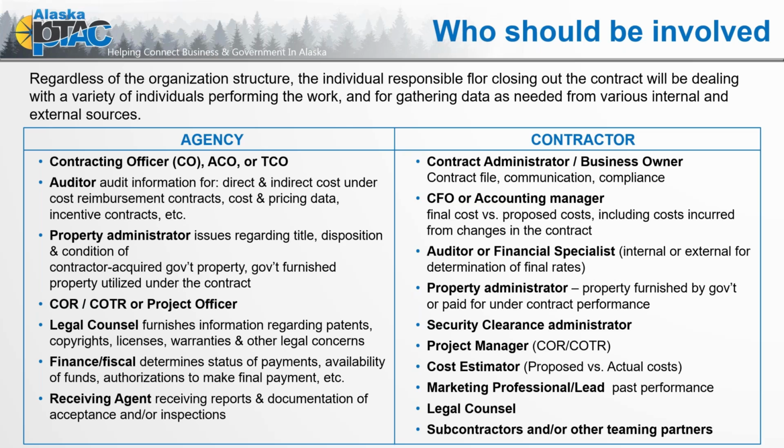And in most cases, that's that relationship between the contracting officer and on the program side. Especially if we're coming through with final payments, there's been contract changes during the process of that contract, and there's been those requests for equitable adjustment to make up for change orders. So we need to make sure that all of those funds are available for that final payment.